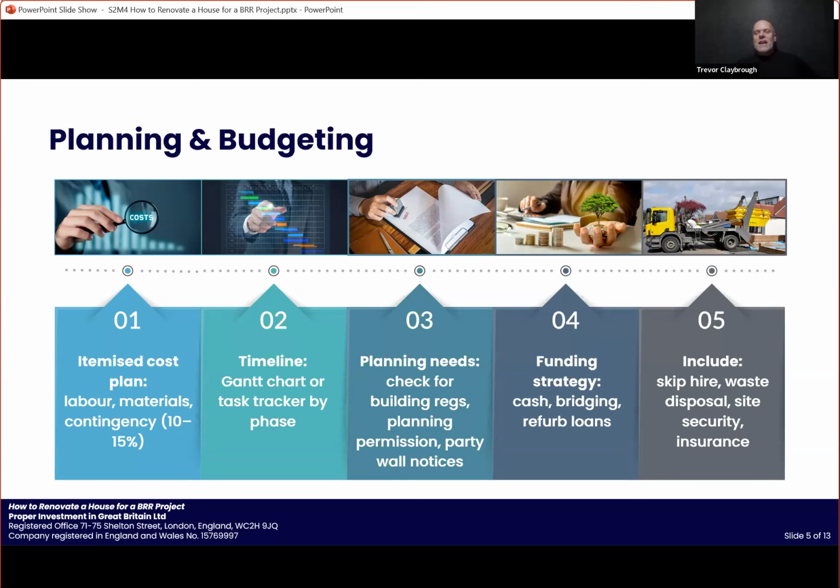What we call a developer margin should be something like 15 to 20%. When I say developer, that means the main contractor, because in that 15 to 20%, part will be their profit, and part will be some of their overheads, administration costs, cost of secretaries, staff, and things like that.